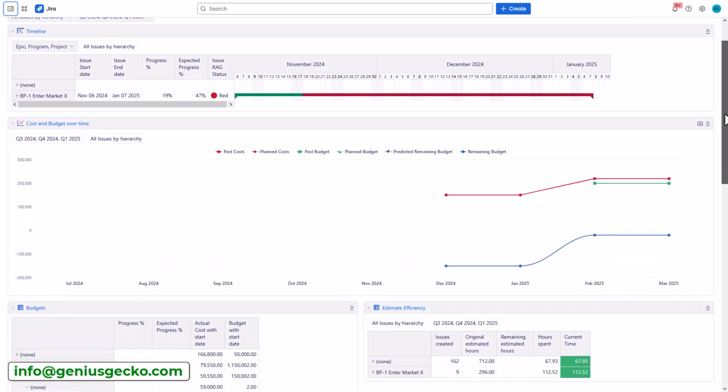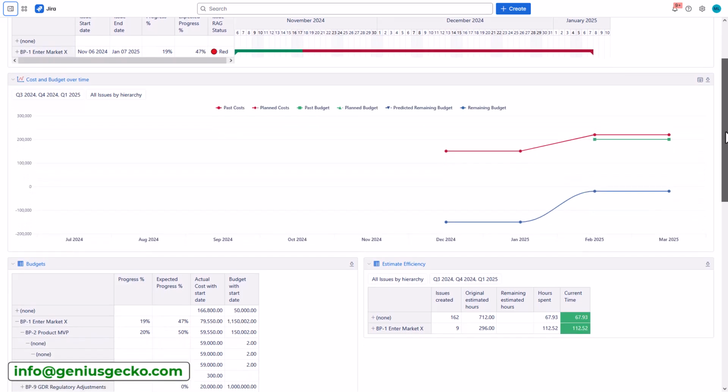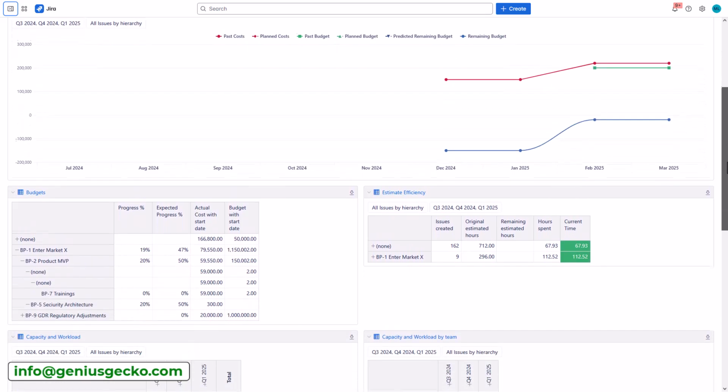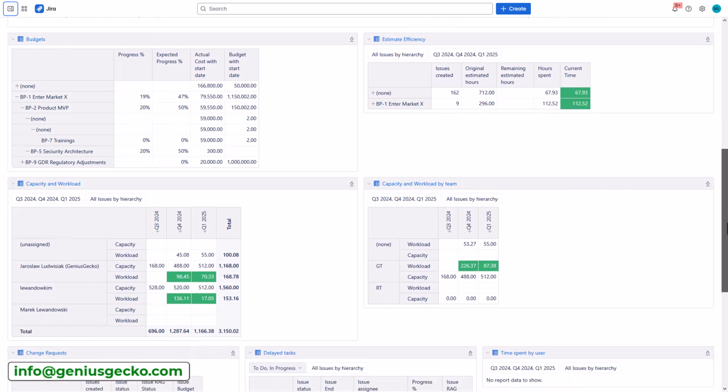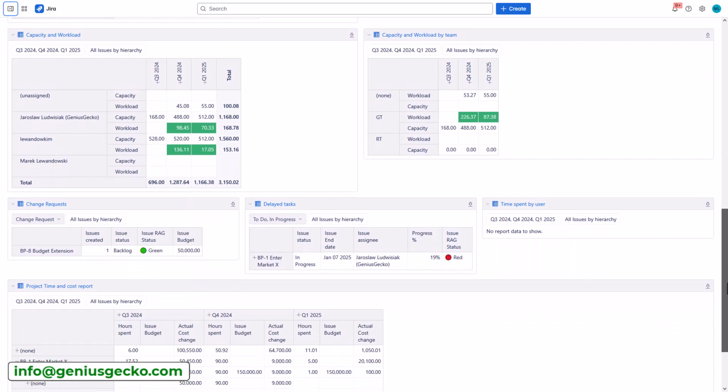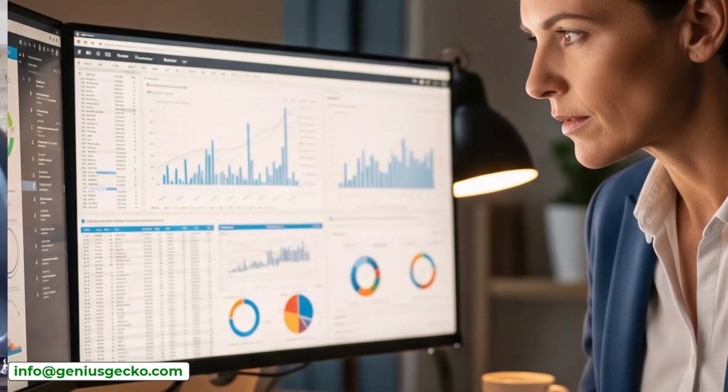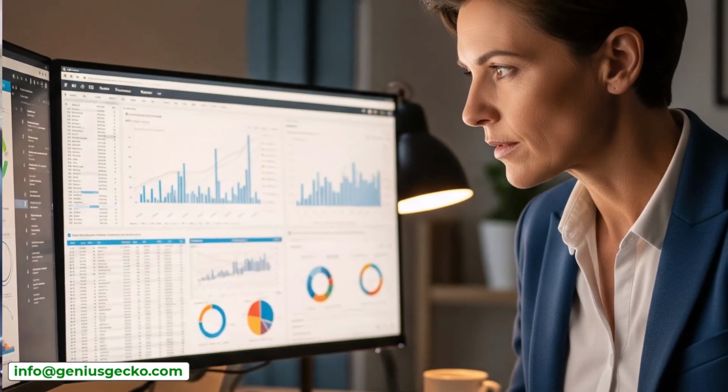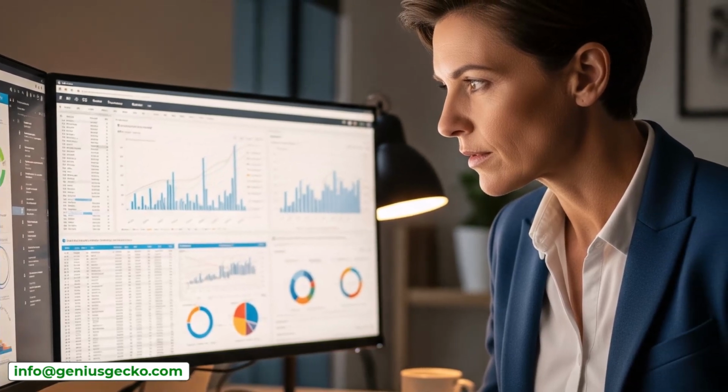Well, you can define a standard set of KPIs, or key performance indicators, for all marketing campaigns within the portfolio. Also, you can implement a centralized PPM dashboard that aggregates these standardized KPIs from all projects, providing a consistent view of the portfolio's performance. And lastly, you can establish a consistent reporting cycle, for example, weekly or bi-weekly updates with clear deadlines and required data points.